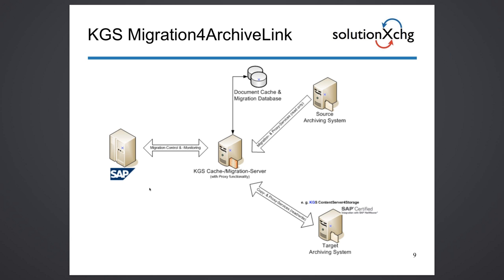If you wouldn't use a proxy, but you would use old-fashioned technology, you can only have one system connected to SAP as the primary system at one time. So either you have to postpone throwing documents onto your new server for a year and a half until your migration is complete, or you will have documents that are not accessible because they haven't been migrated yet for a certain period of time. Both very undesirable scenarios in a migration environment.